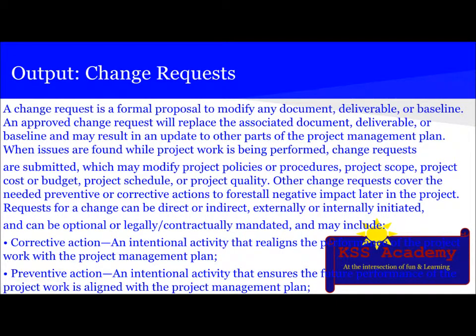The next output is change requests. A change request is a formal proposal to modify any document, deliverable, or baseline. An approved change request will replace the associated document, deliverable, or baseline and may result in an update to other parts of the project management plan. When issues are found while the project work is being performed, change requests are submitted, which may modify project policies or procedures, project scope, project cost or budget, project schedule, or project quality. Other change requests cover the needed preventive or corrective action to forestall negative impact later in the project.